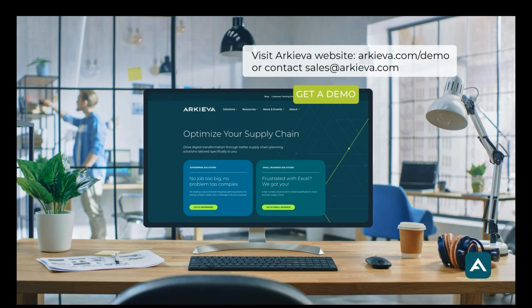What I was trying to say, maybe it did not come across very well, is that wholesale process changes should be done as a separate project prior, not after, but prior to the implementation, if such a change is needed. If, on the other hand, wholesale changes are not needed and only incremental changes are needed, then they should be done as part and parcel of this project.